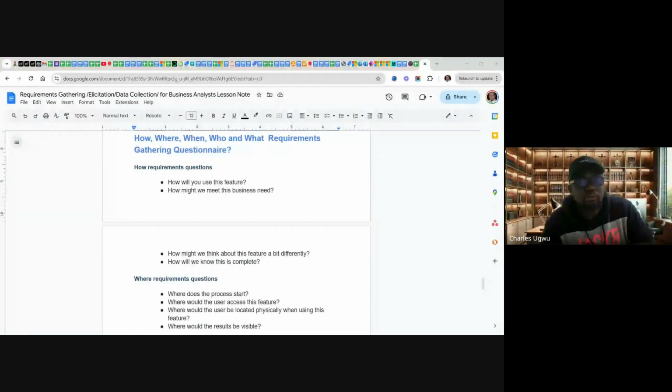Some of the features that the stakeholders say, yes, it's good to have, but even if we don't have it, we can still do our job. This should be at the bottom. So when you start prioritizing them, you know where to grade the most important as must have. So even if the resources finish, you don't have any resources, the budget or anything, you must have captured the most important items in the project. So that's why.